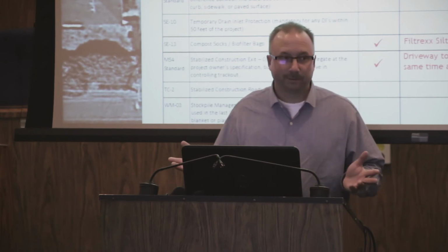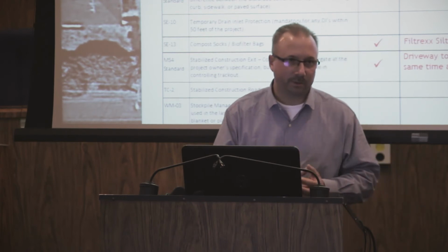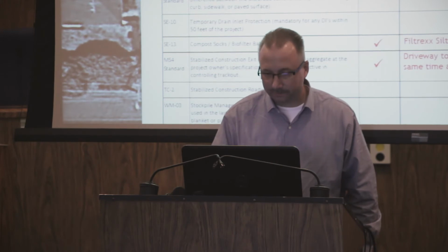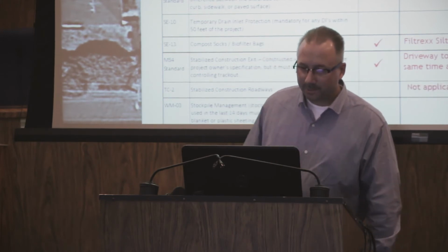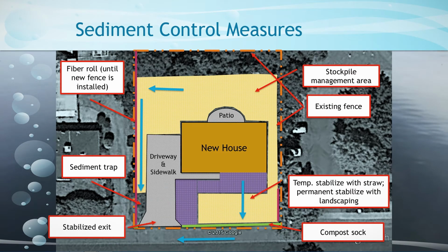It's going to be the driveway. That's why we put the driveway in early. That's going to be our construction entrance and exit, and that's all that's needed. Stabilized roadways, really not applicable in this case. And then stockpile management, yes, in the backyard most likely is where we're going to keep that. So let's take a look at what this will look like on the map.